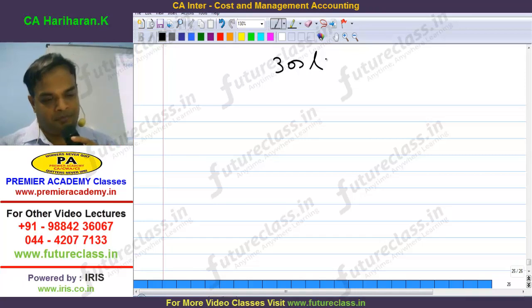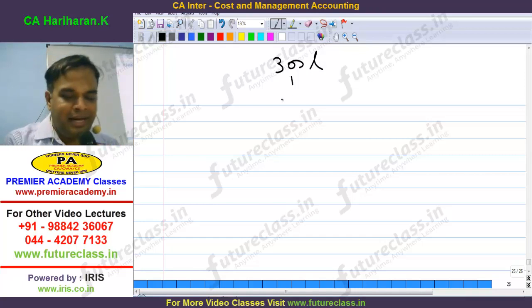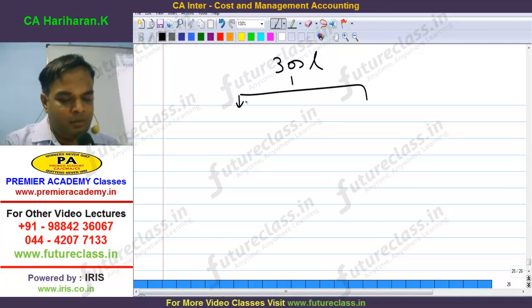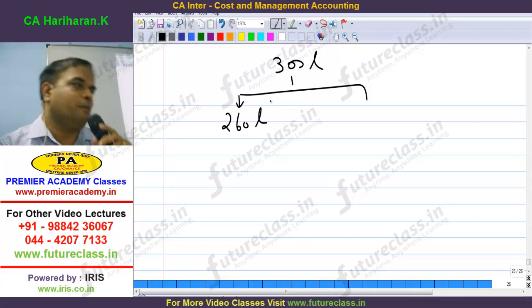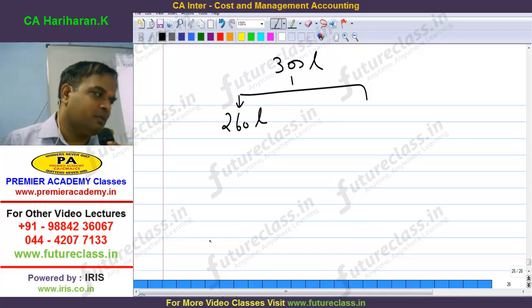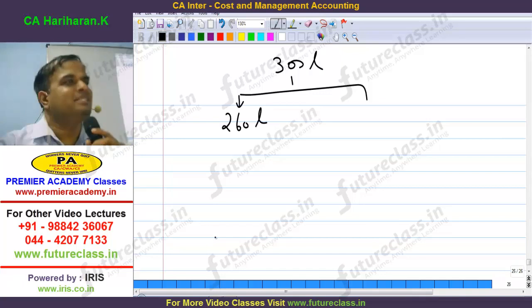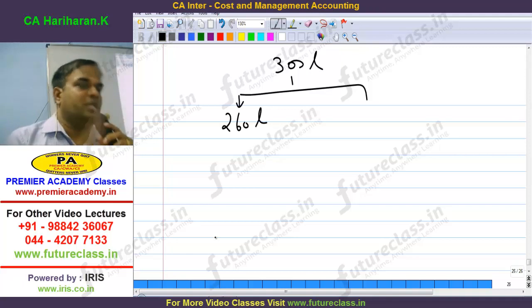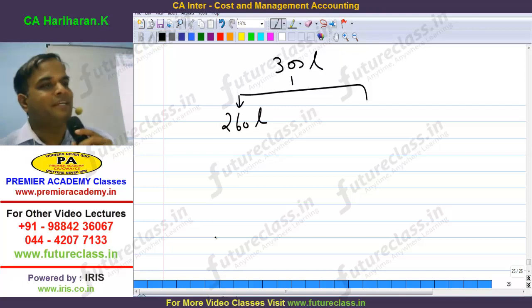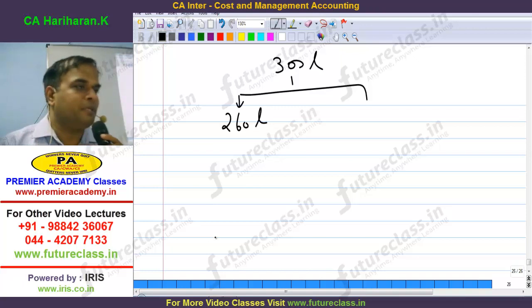What is that called? Progress payment. Assume as on 31st March, one particular day, I have completed 260 lakhs worth of property, and the balance I will do in the next period. Now I am coming and asking, Karthik, I have completed 260 lakhs worth of property, so why don't you give the money now?